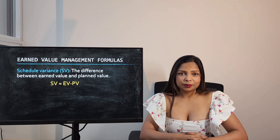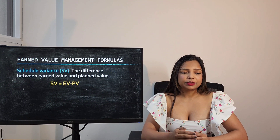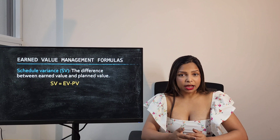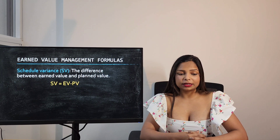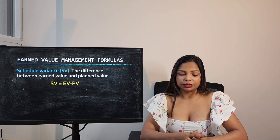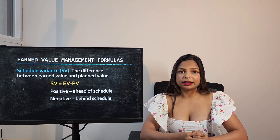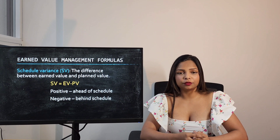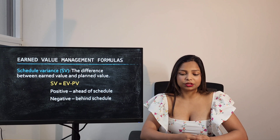Schedule Variance is the difference between Earned Value and Planned Value. The formula to calculate Schedule Variance is EV minus PV. If Schedule Variance is a positive number it means your project is ahead of schedule, but if it's negative it means the project is behind schedule.